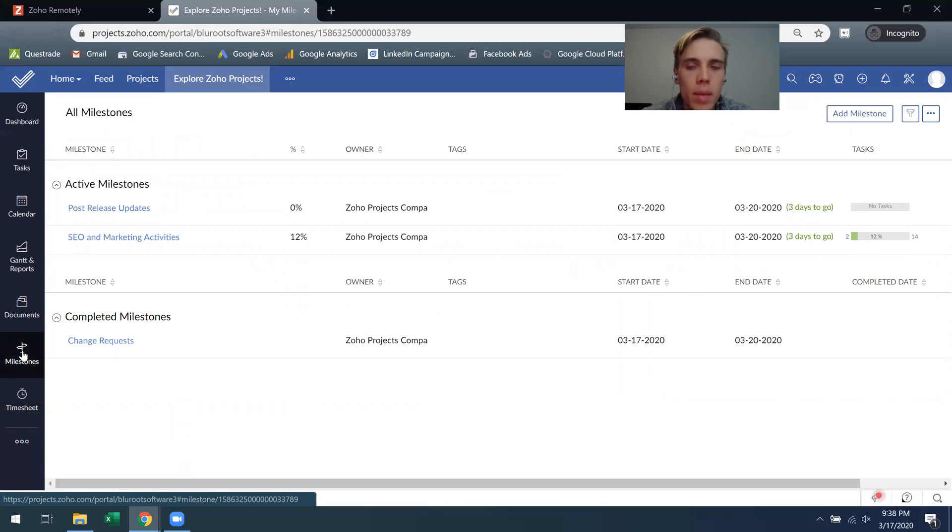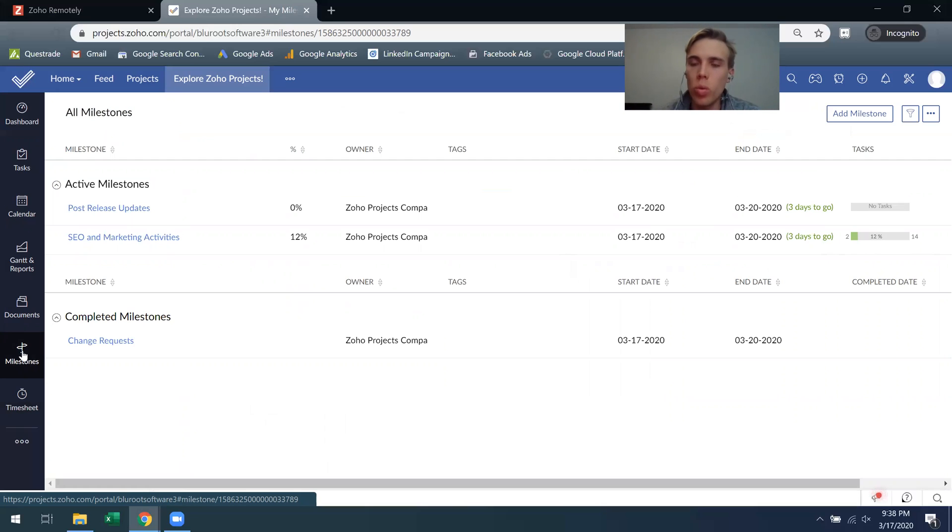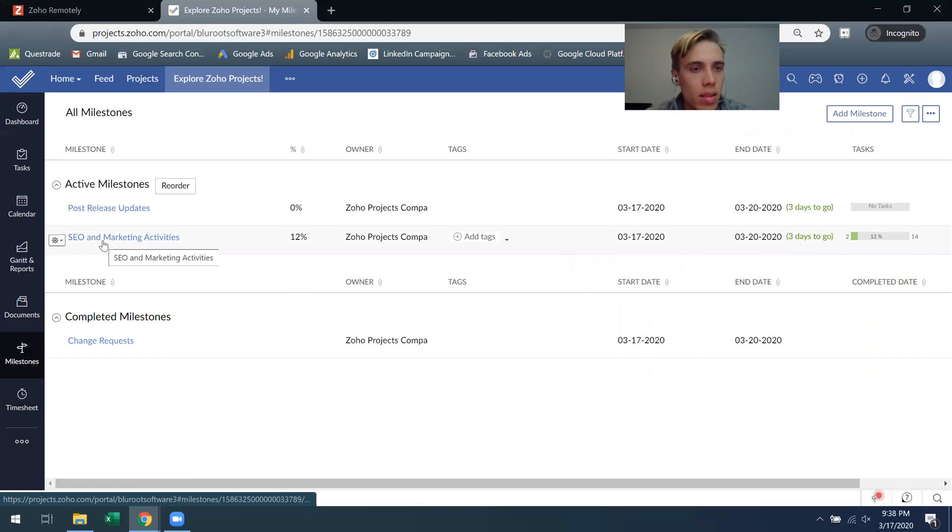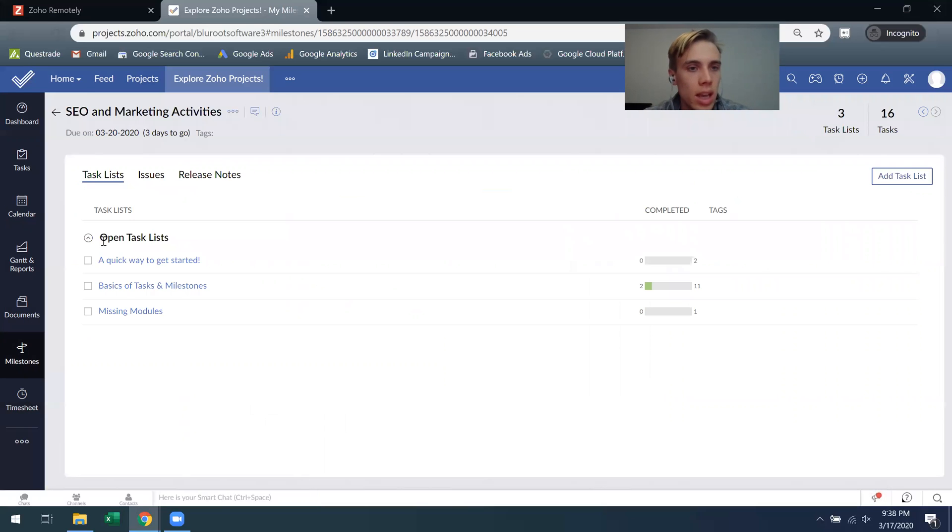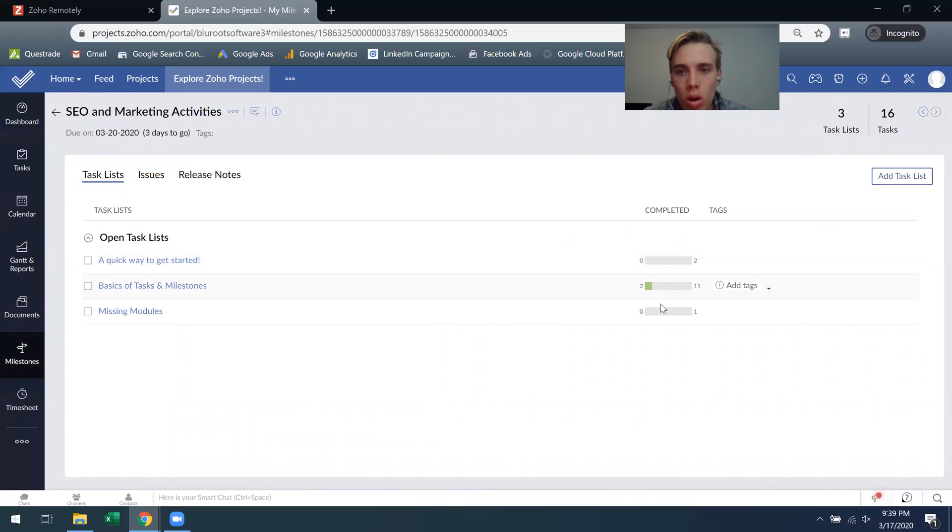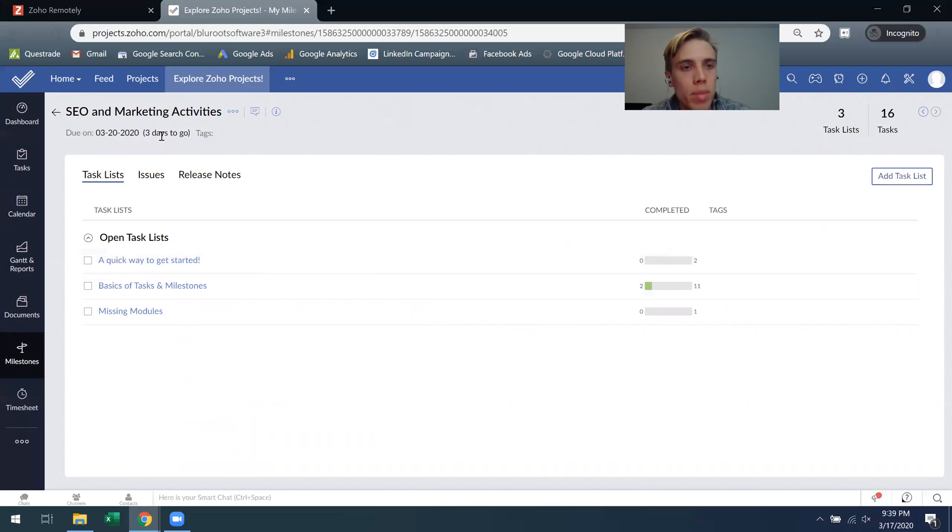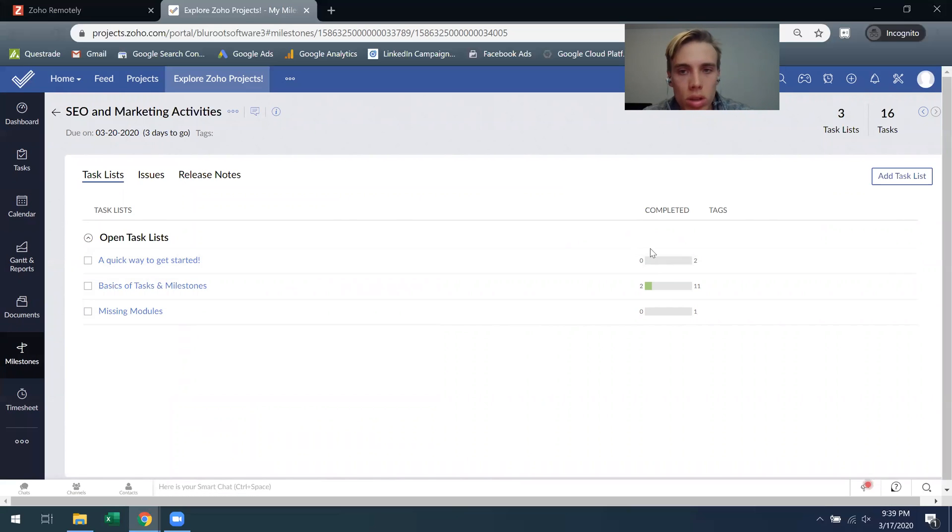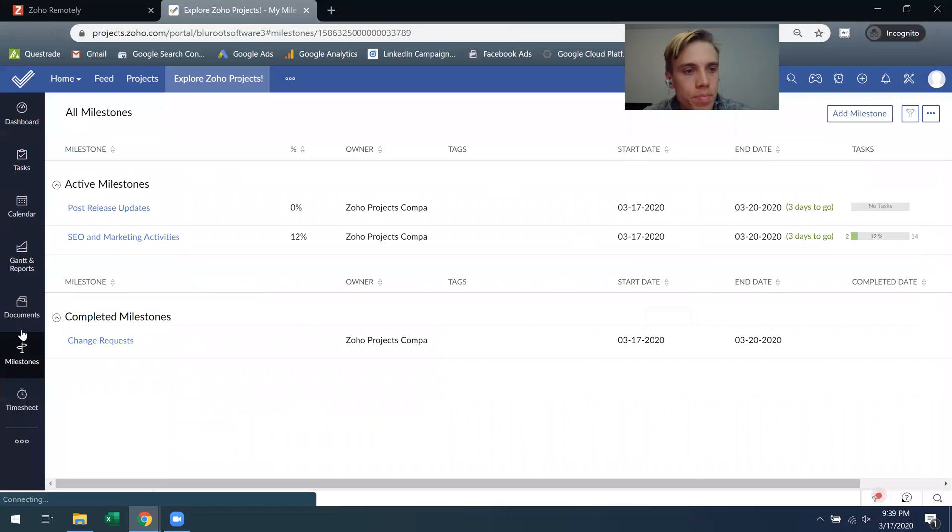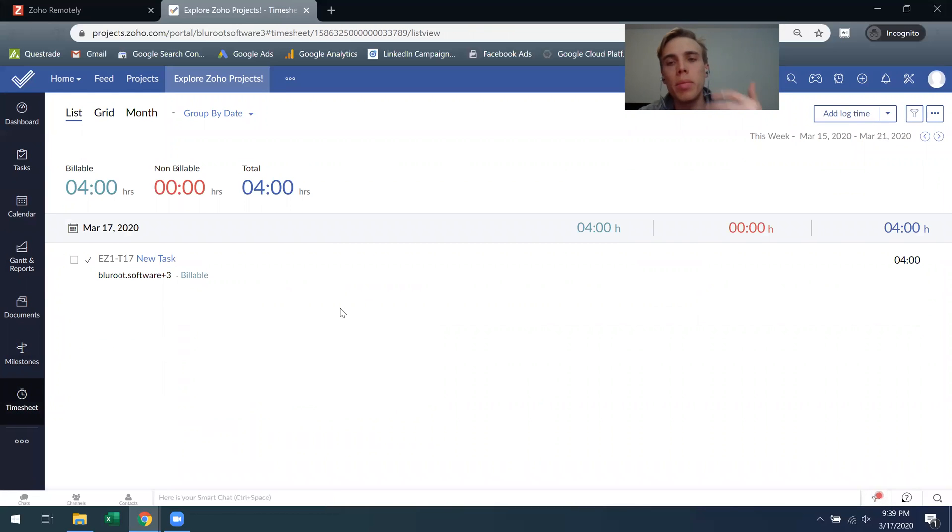Milestones I touched on a couple times, but the idea is many tasks are built into a milestone. So the idea is you can say within a week we need to get these 10 tasks done. As an example, this SEO and marketing milestone, we have these task lists within them and so the goal is to complete all of these tasks within the task lists by the time that the milestone is up, and it will remind me saying three days to go to do these individual things.